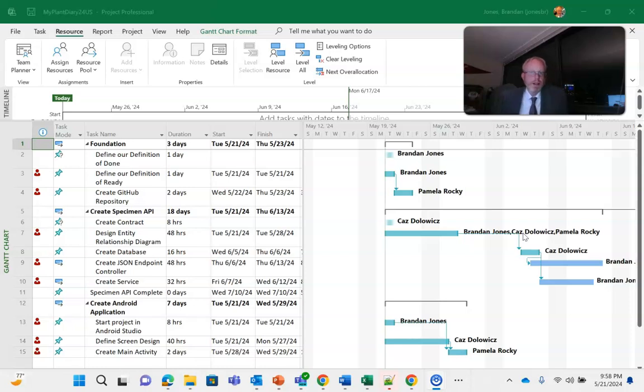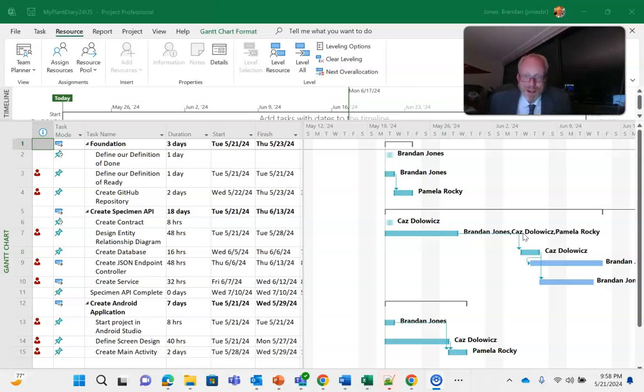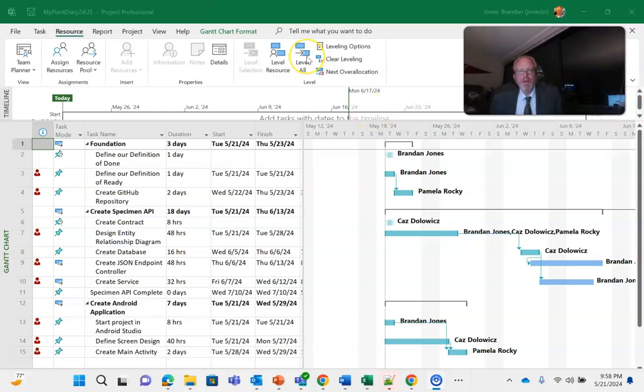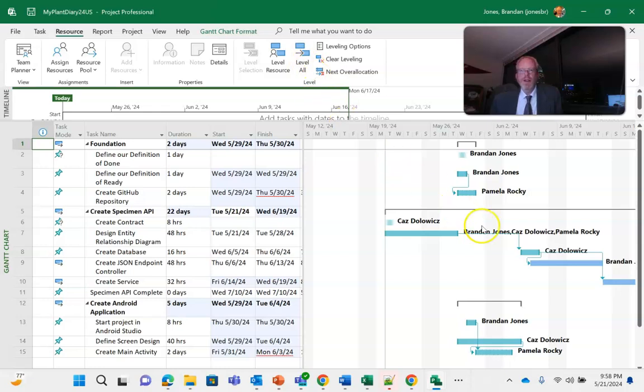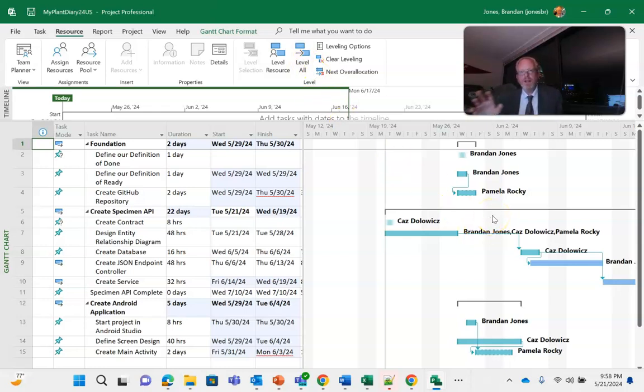But watch what happens when I say level all. Notice that a lot of these tasks have now moved because it's trying to say okay, I know I have an over-allocated resource and that did pose some challenges on our schedule.